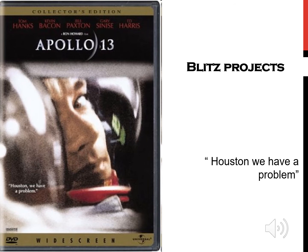It is important to notice the difference between time-critical projects and blitz projects. In time-critical projects, there is a specific target date or window of opportunity that is known well in advance, so there is time to plan and prepare to meet the project deadlines. Conversely, in blitz projects they emerge from a crisis — something unexpected. There is no fixed date to meet, but there is the need to fix or solve the issue as soon as possible.